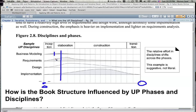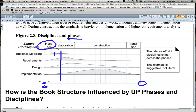What you see that's different in this diagram is the classification of time segments in the project lifecycle into phases. There are four phases in the project development lifecycle, and as you can see they are not equal with respect to the time you spend. The first phase is called inception, the second is called elaboration, the third is called construction, and the fourth is called transition.